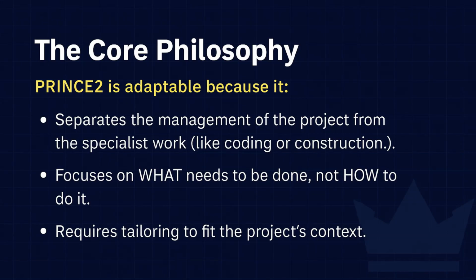Think of it like this. The project manager is given a target for, say, cost or time. But they're also given an acceptable range of deviation around that target. That's the tolerance. So maybe the target budget is £100,000, but there's a tolerance of plus or minus 10%? Precisely. And those tolerances do something really important. They establish the project's priorities implicitly. Maybe the time tolerance is 0, but the cost tolerance is larger. That tells you time is more critical.